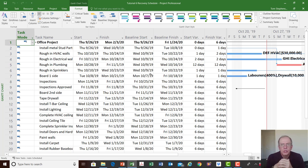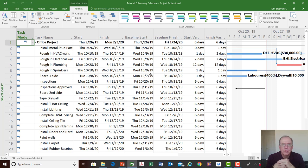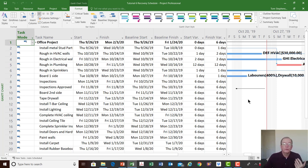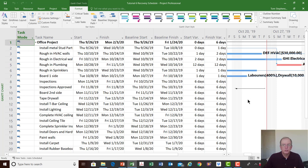If you've been delayed for reasons the client caused, you're looking for a change order for the extra costs, which might involve working weekends, overtime, or other measures to get back on track. This helps you to reschedule all remaining work and better implement the rest of the project because you understand how you've been impacted by what just occurred.